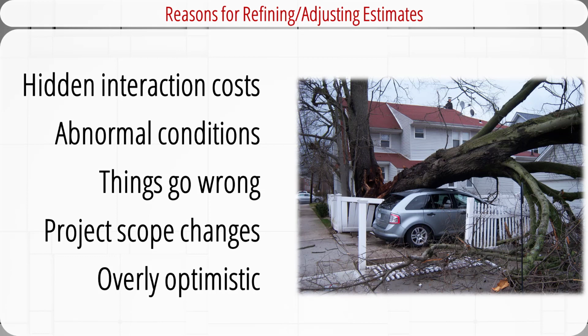Lastly, research indicates that there is a tendency in people to overestimate how quickly they can get things done and underestimate how long it will take them to complete tasks. The inaccurate estimates due to this overly optimistic attitude need to be corrected. Also, there is growing evidence that some project promoters underestimate the costs of the projects and overestimate project benefits in order to win approval. This is particularly true for large-scale public work projects. We will show you some examples later.